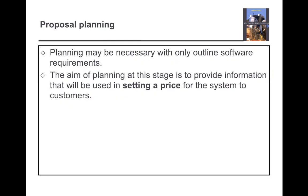Taking planning stages and project planning together, let's see what proposal planning is. Proposal planning may be necessary with only outline software requirements — that is a very important term. The aim of planning at this stage is to provide information that will be used in setting a price. The main agenda of proposal planning is to give a cost estimate to the customer for a particular software development.